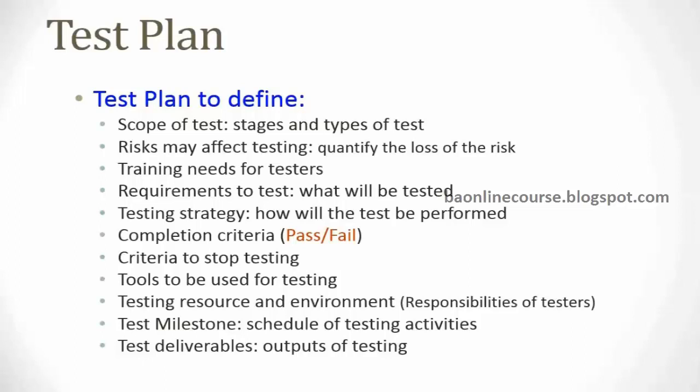And what is the overall test strategy, right? So what type of test needs to be done? All those testing scope, and then the approaches will be identified. We'll also say what is the completion criteria. So ideally, you would say when all those test cases which have been created are satisfied, are passed, then you will stop testing, right?